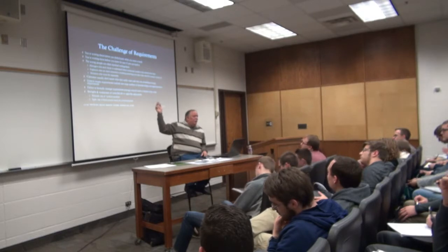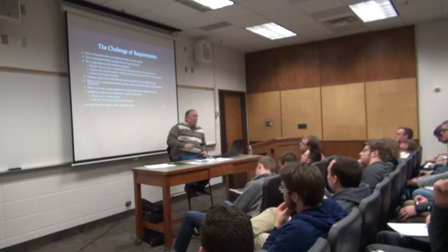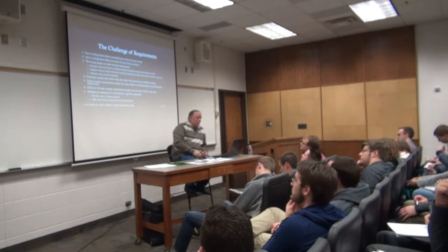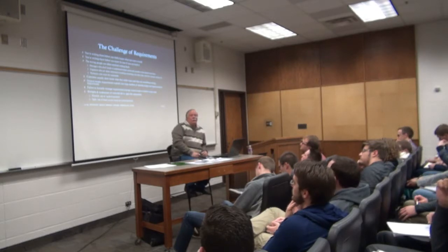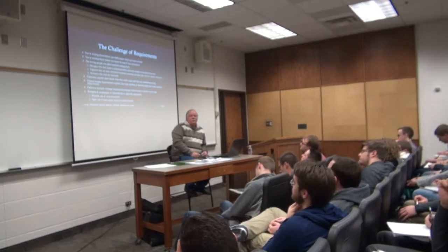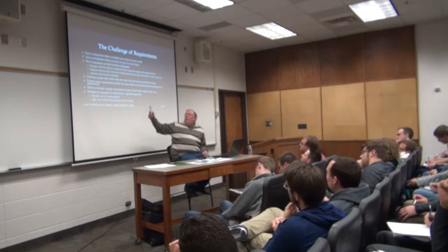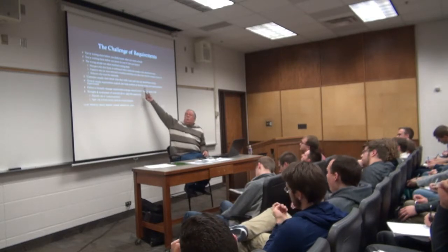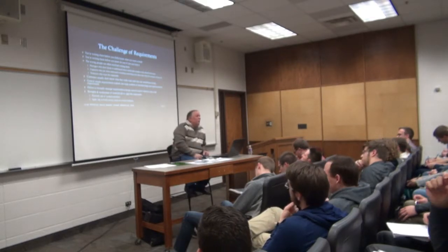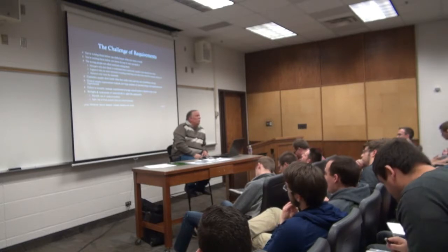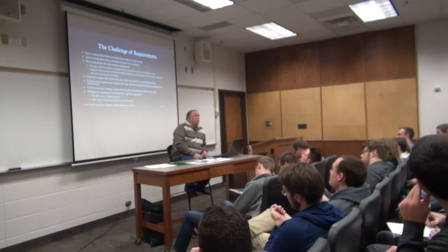Usually there's often a failure to formally manage requirements via change control. And what happens here is you get a lot of scope creep. In other words, it's kind of like, oh yeah, that's a good feature, let's throw that in there. Now, as you're throwing features in, then you have this whole explosion thing. So, it's going to get out of control. A lot of project failures are due to scope creep.